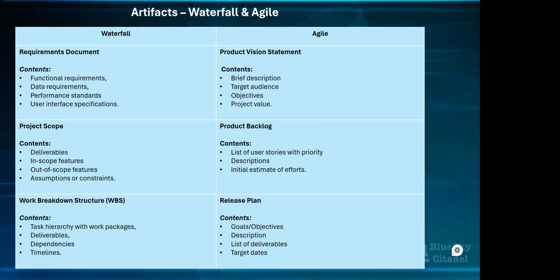So there's an initial story point that is put on it before you even have to work on it. Before the sprint you bring it into, maybe doing refinement before that sprint, you're looking at that estimate and the story points on it and saying, is it still the same? Based on what we know now, is it still the same? Are there some complexities now? With what we know now, does the story point need to be reduced? Should it be increased or reduced? All those things are part of the content of what you have in your product backlog.